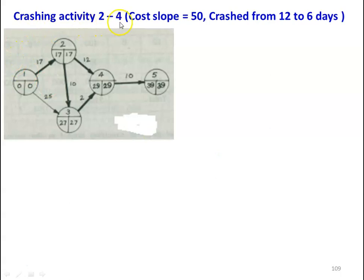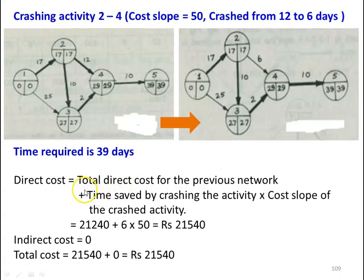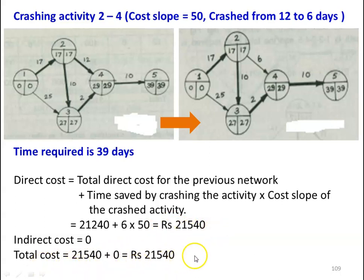Then, crashing activity 2-4 with cost slope 50, from 12 days to 6 days. There is no change in the project duration — it remains 39 days. Direct cost = 21,240 plus (6 days saved × 50) = 21,540. Total cost equals 21,540.